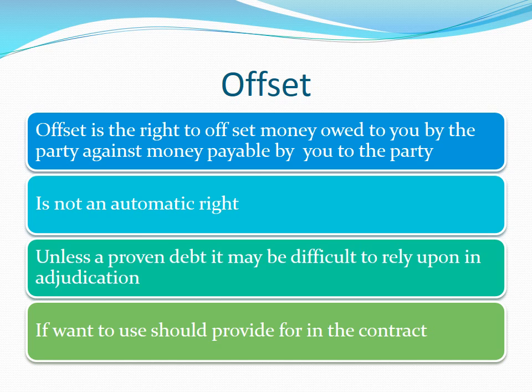respondent. Writing a security payment submission is made easier if you remember there are 2 grounds for claiming payment and only 3 grounds for refusing to pay. Defects, damages, and offsetting are not grounds for refusal to pay a payment claim under the security payment process unless the contract specifically allows for them.